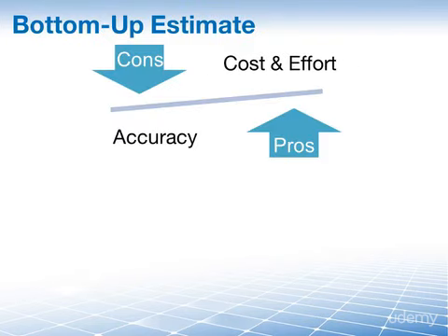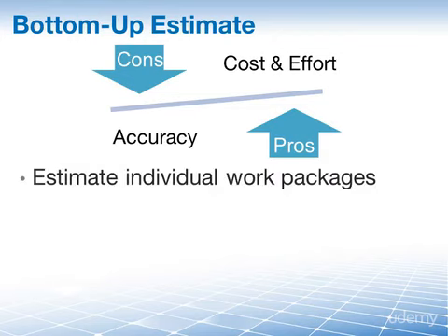There is one technique that is used in cost estimation that is not a technique that applies to project time management, and that's bottom-up estimating. We know that analogous estimating is almost like making a broad guess. In contrast, bottom-up estimating goes down into the individual work packages and estimates each one in detail.